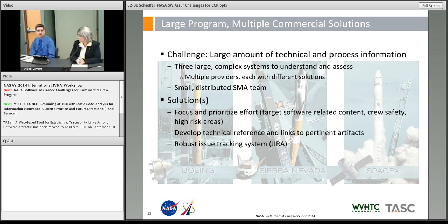We also identified minimum success criteria as well as stretch goals. Anything we were assigned was minimum success for us. We wanted to make sure anything that our point of contact was assigned had good coverage. But we also saw a need for additional activities that we'd like to get to. So we identified those as stretch goals and pursued those in the valleys of the effort during this time, as much as we could.